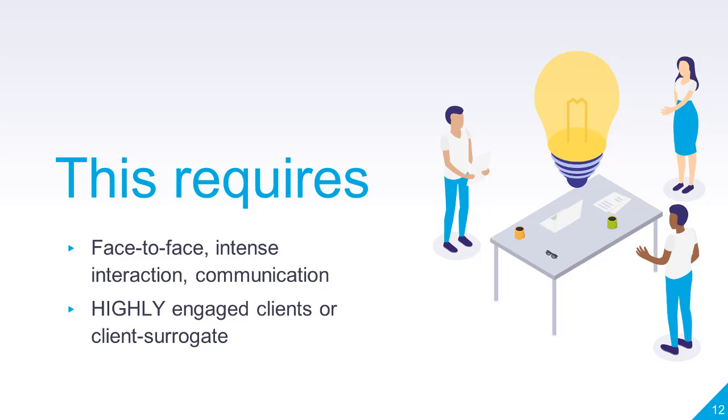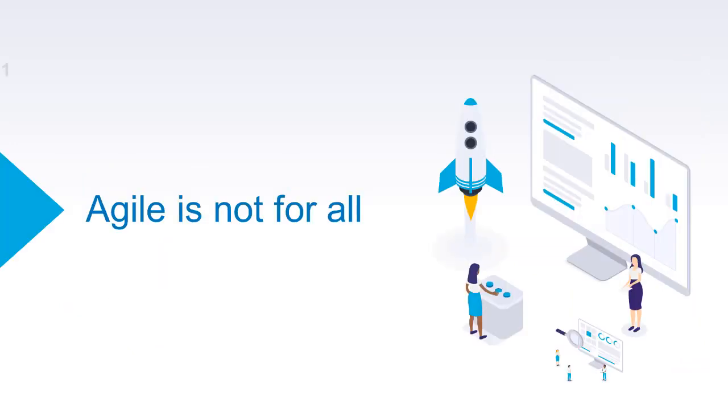As such, Agile is not a good fit for all designers' clients. Agile is also not suited for all projects. For example, projects that are mission critical, have high demand for safety, inspection, testing, or need planning, oversight, and checkpoints are not good for Agile. Also, projects that need a stable architecture or framework are not best suited for Agile methodology. Finally, it must be noted that Agile is not comfortable for all system analysts and designers.